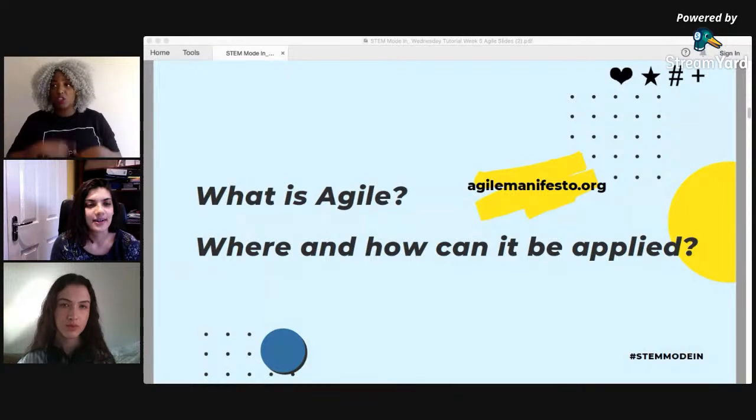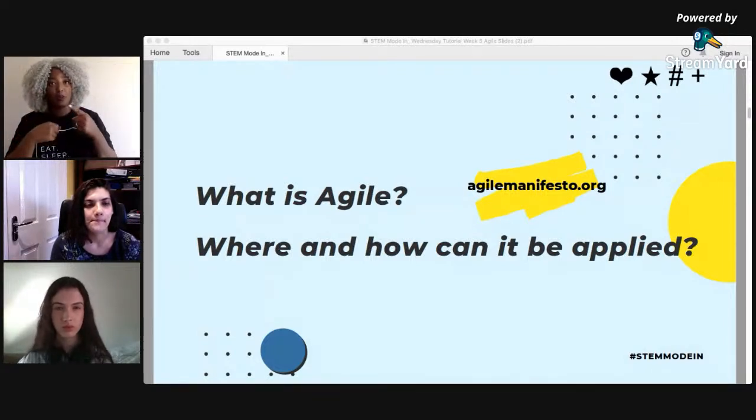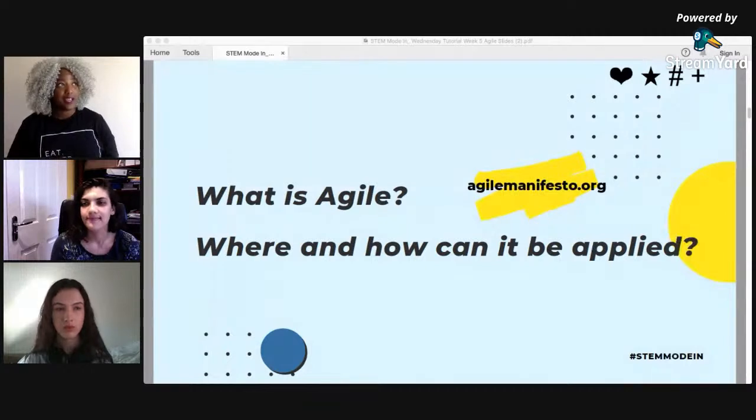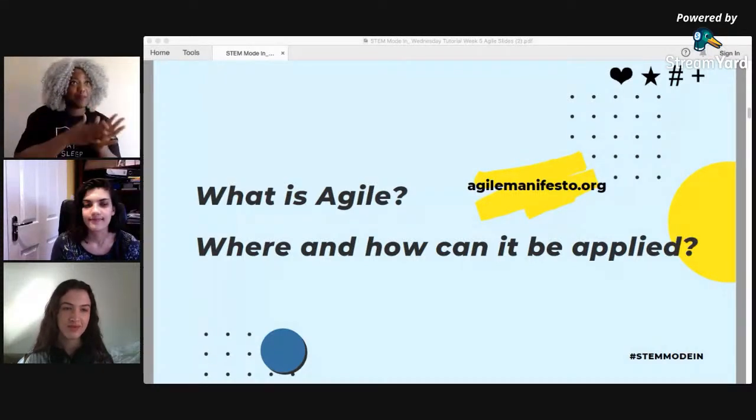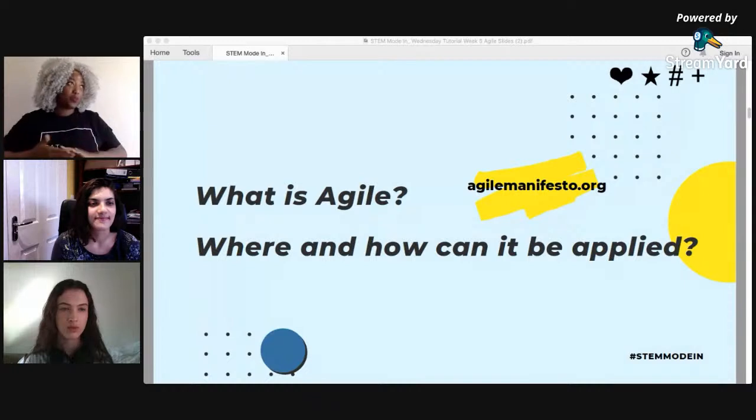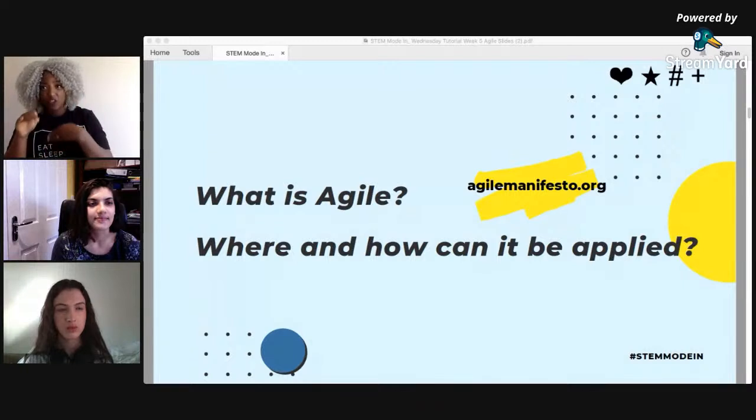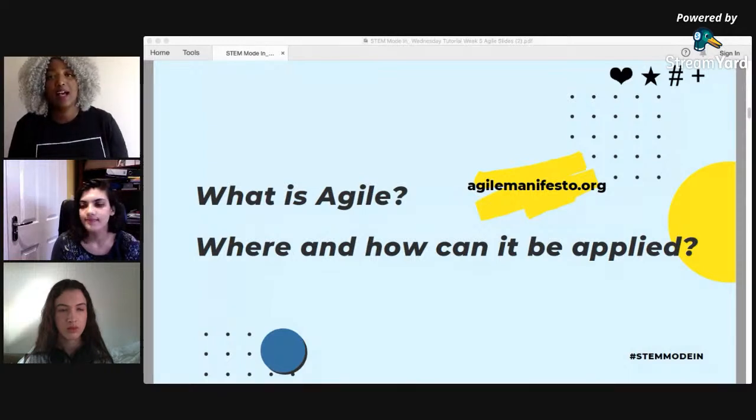But with Agile, we have a framework that means we're able to check in as we go. It's similar to saying, we know we want to build a house, let's build a couple of walls first, see how that goes. Then we'll add a couple more walls, see how that goes, and check our budget. Maybe you planned a 4-bedroom house, but actually you realize you've only got space or budget for a 2-bedroom house. Agile is the way of continuously iterating, as we call it. You just keep trying and you work in cycles to get it to work.